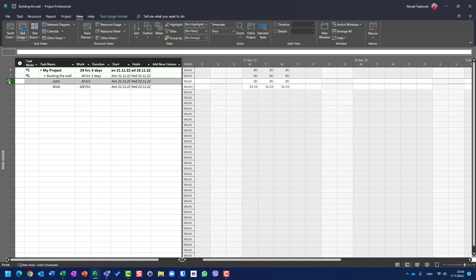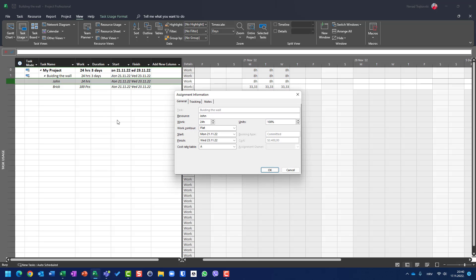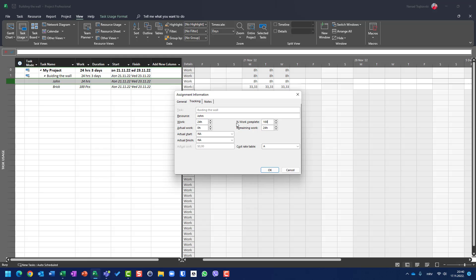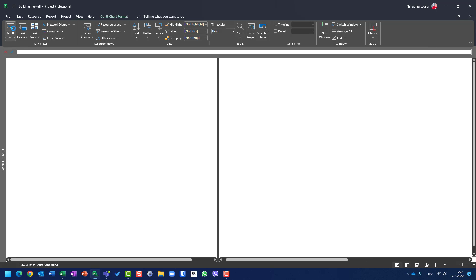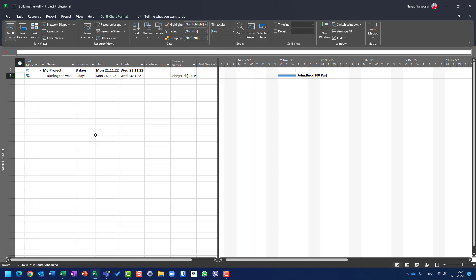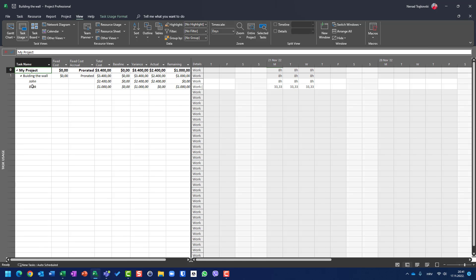How can we record that? For John, you already know — I'll go to Tracking and say John spent 24 hours, or I can say everything went fine and he finished 100%. But the task is not 100% finished yet. Why? Because if we go to Task Usage view and look at cost, we will see that actual cost for bricks is zero.